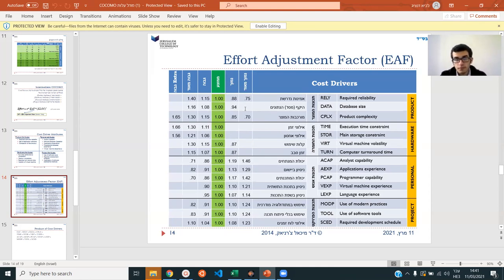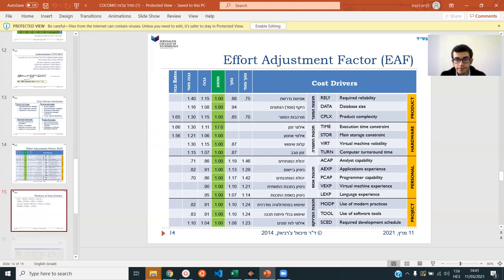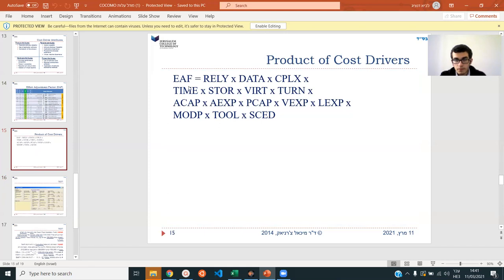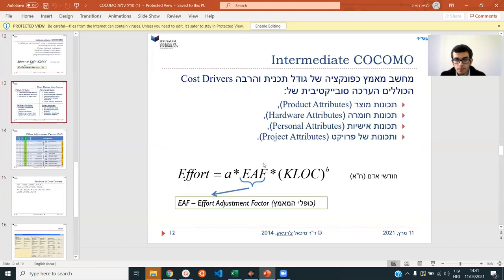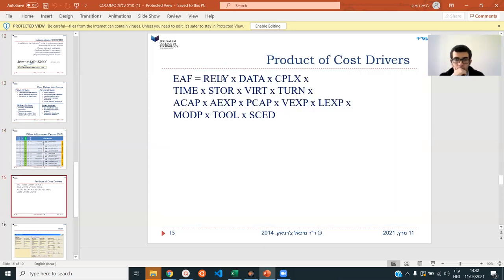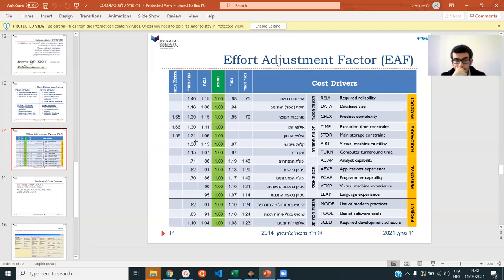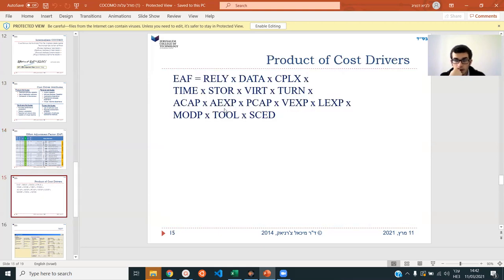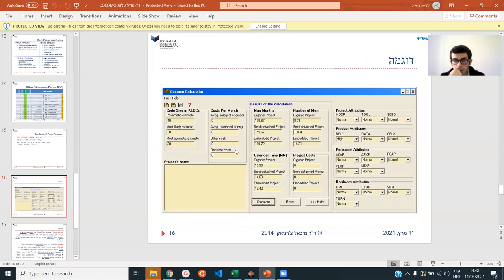The EAF is simply the multiplicative product of all those numbers — so it might be 1.17 times whatever, times all the numbers you took from this table. For each category you can only choose one value. You multiply them all together and you'll get some number which will be around one, maybe a little higher or lower. That is your EAF. Now there's a more complicated calculator that has all those parameters in it — project attributes, tools, normal, high, low, etc. — but you should be able to do it by hand.